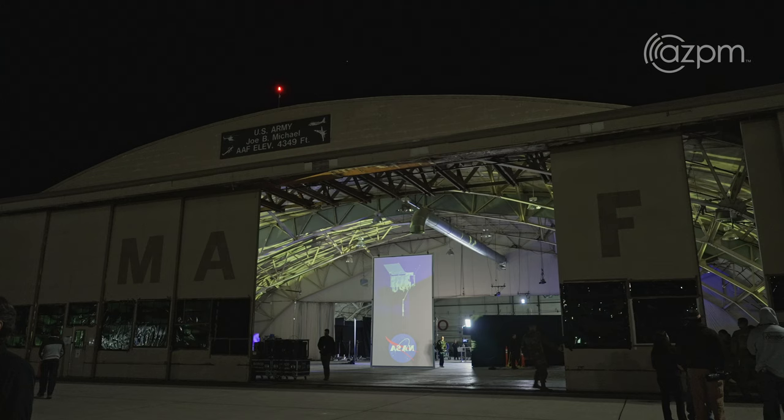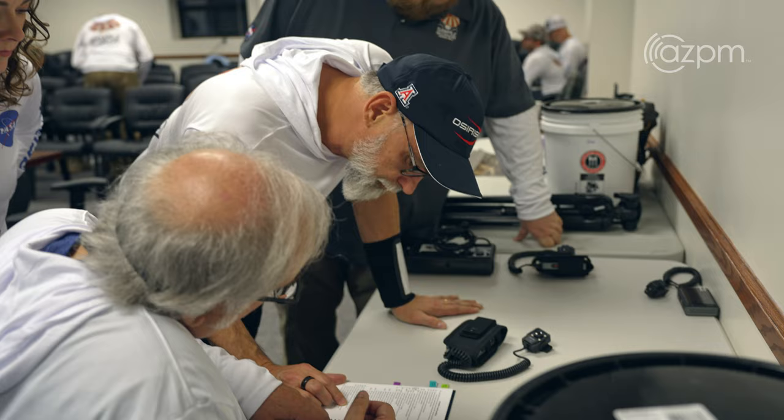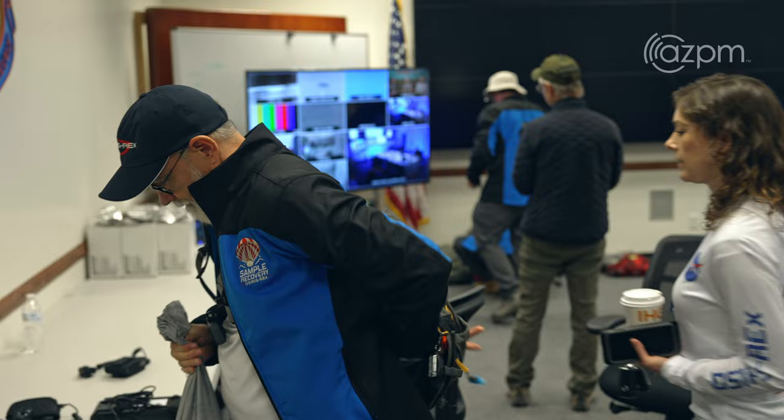The day actually starts really early in the morning, and there's a critical decision at 2 a.m. Go, no go. Are we releasing the capsule, or are we in a situation where we have to hang on to it and delay the sample return by 2 years? Yeah. I've already voted go, so that's on record. PIs go, right? But I don't get the safety vote. And then there's a whole series of commands and operations that happen to the spacecraft, ultimately releasing the capsule where it hits the top of the atmosphere about 4 hours later.